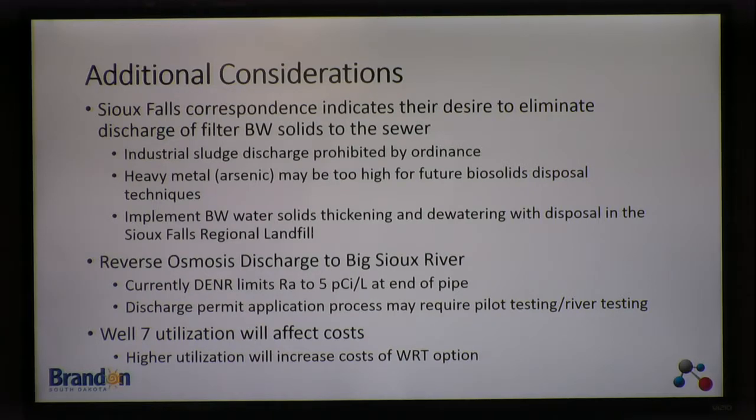And would, as a result of this, in the alternatives that we have developed, they implement backwash water solids thickening and dewatering with disposal in the Sioux Falls Regional Landfill. And discussions have been held, email trails and discussions and so forth with the regional landfill to understand what the requirements are for hauling to the landfill. And basically it's that the sludge solids need to pass the pink filter test.